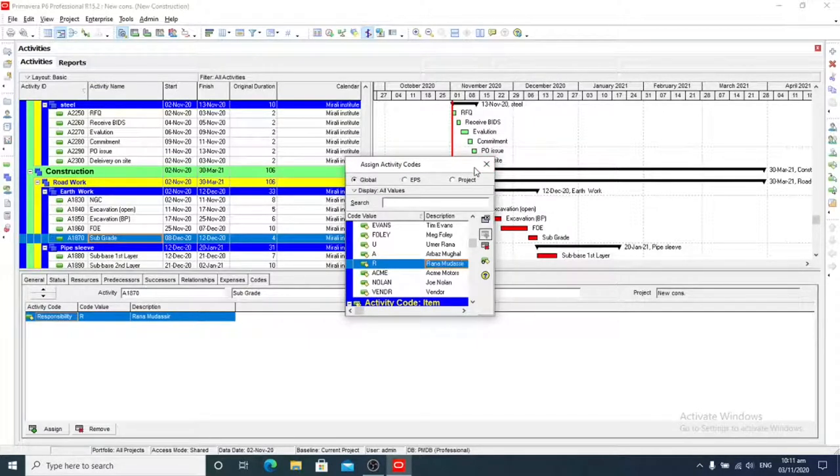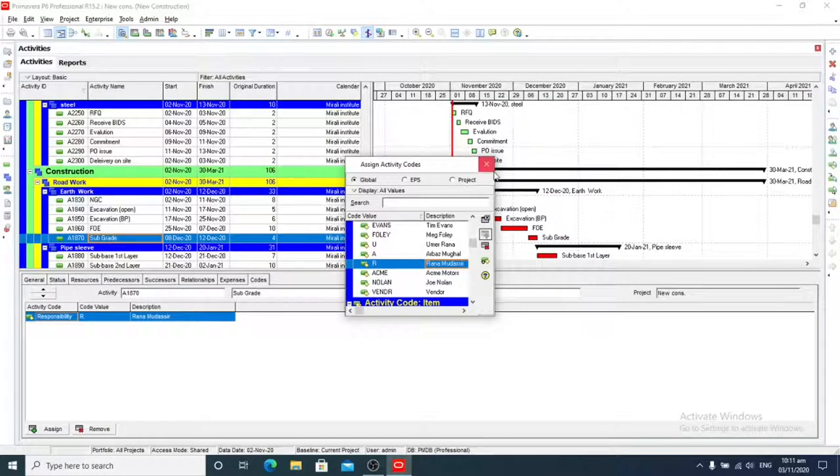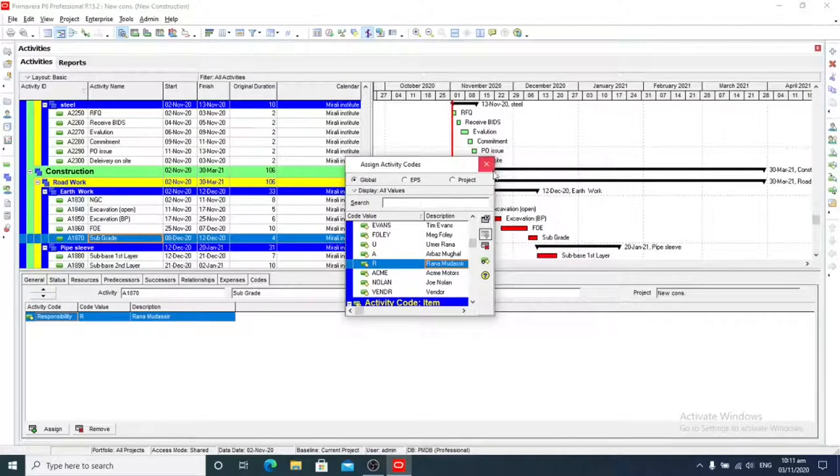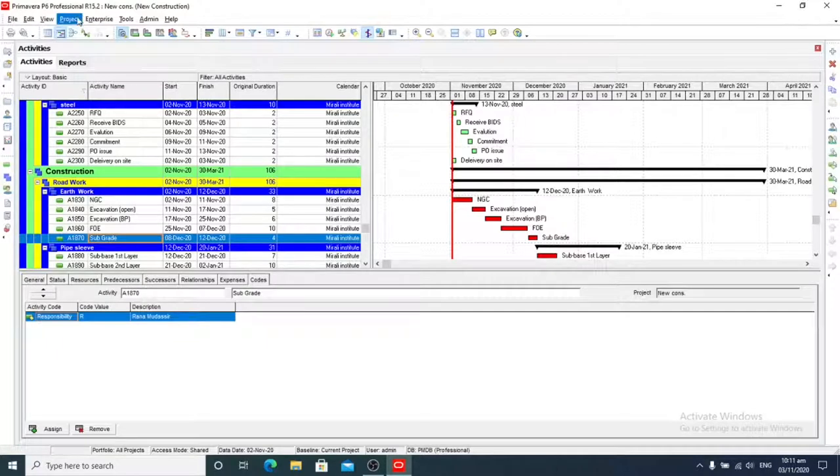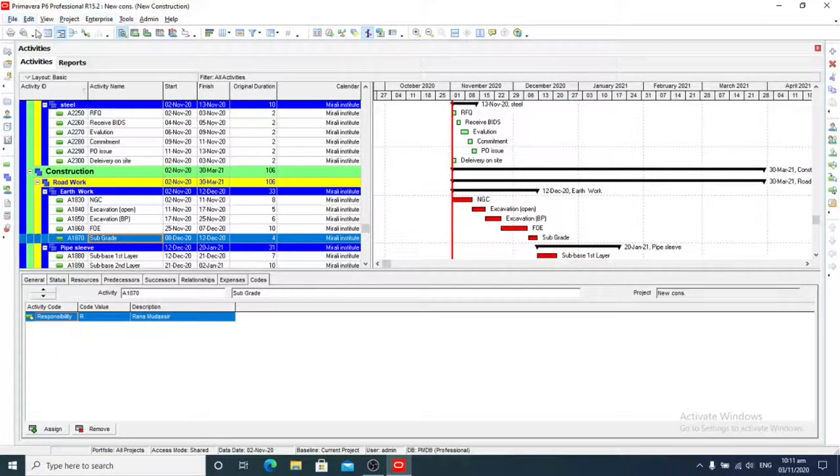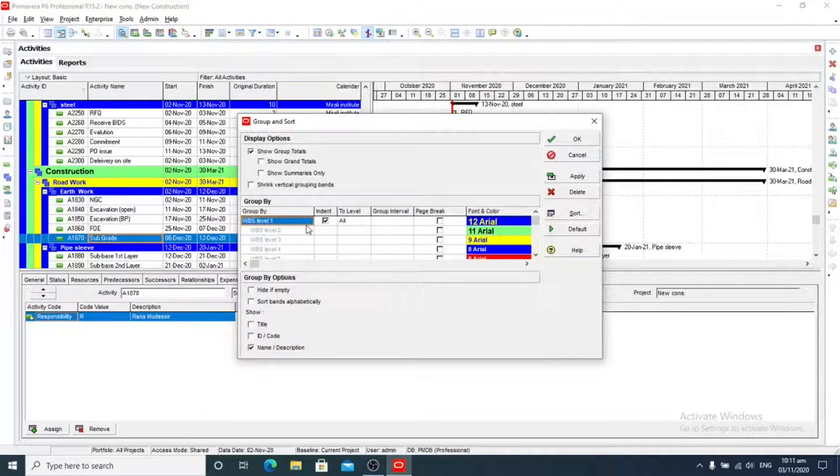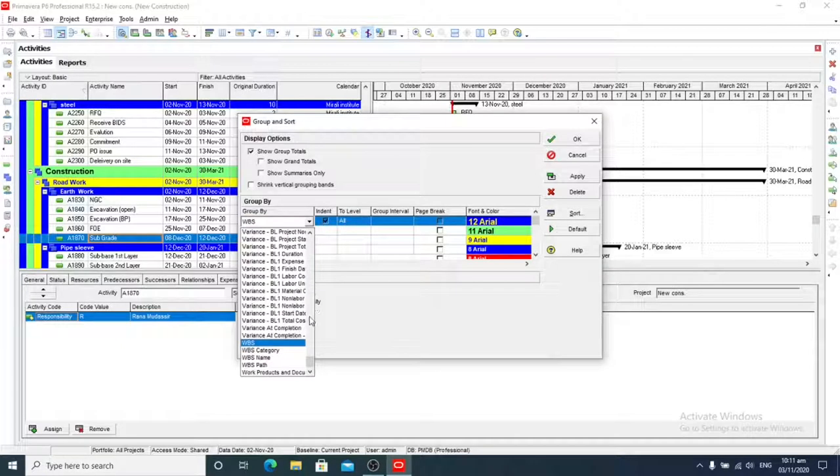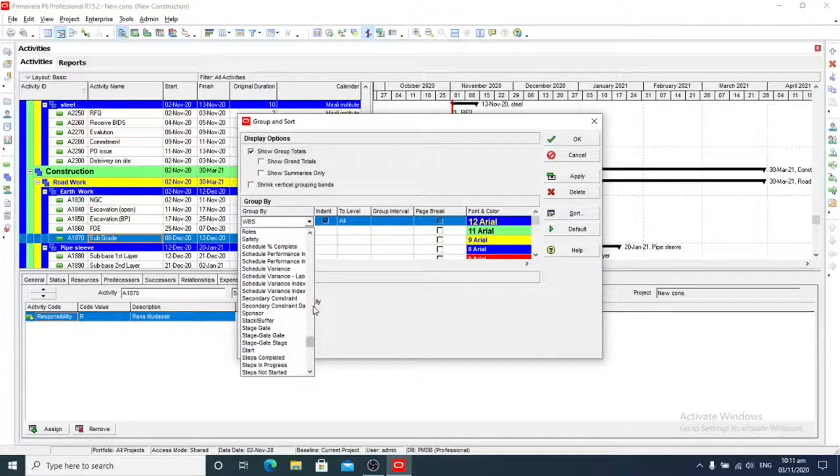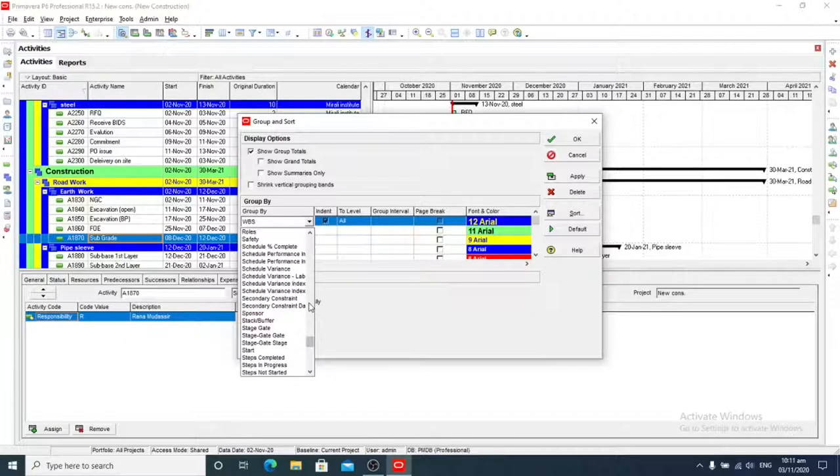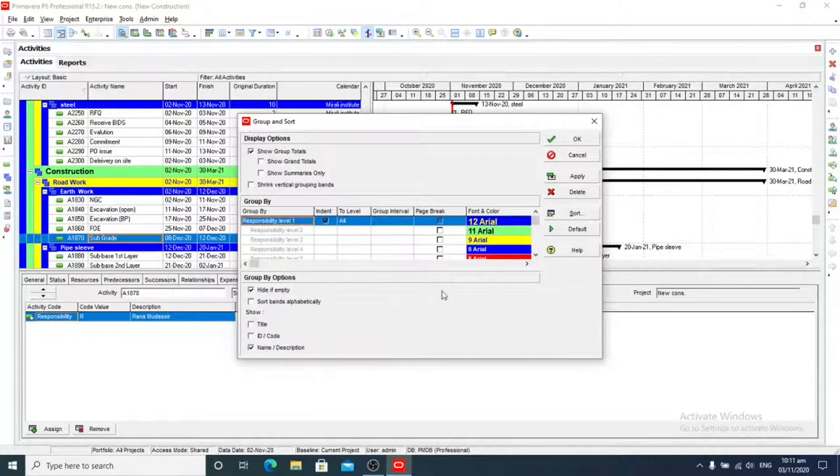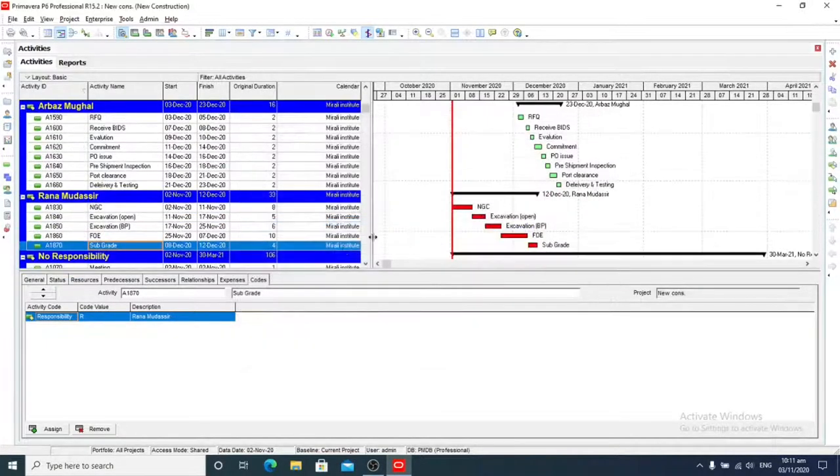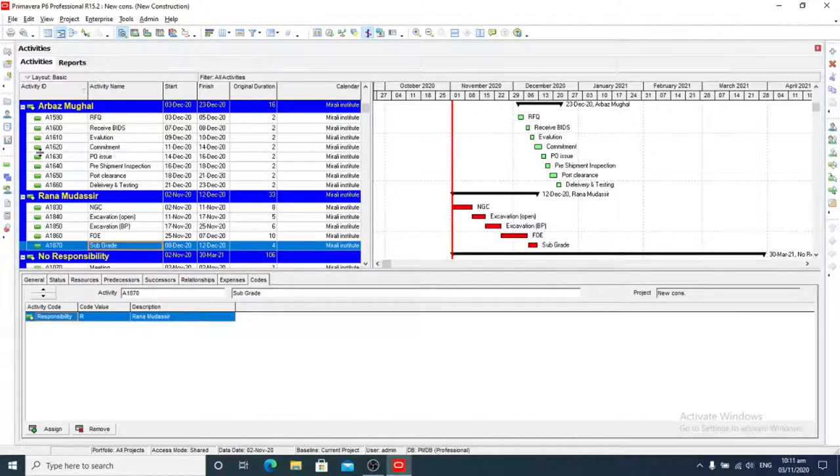We added all managers and responsibilities to all activities. Now we want to filter this and see them. We will click on View, then Group and Sort By, and here we will select Responsibilities. So these are activities and we will apply OK. So for all our managers and engineers, these are all activities.